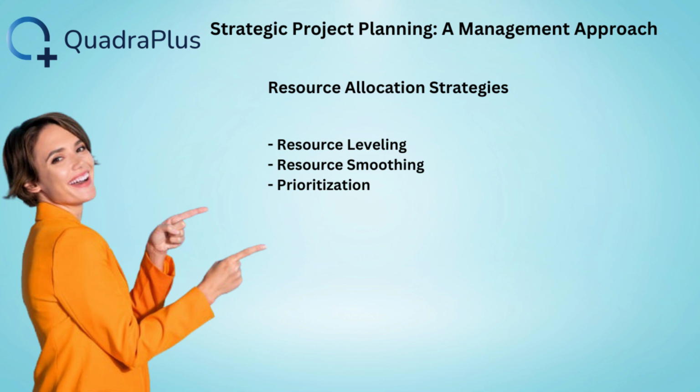3. Maintain flexibility for resource reallocation. Project managers should plan for contingency resources, extra personnel, backup budgets, or alternative suppliers to address sudden changes. Example: manufacturing supply chain flexibility. A factory experiences a shortage of raw materials. Because an alternative supplier was pre-approved, the project continues with minimal delays.